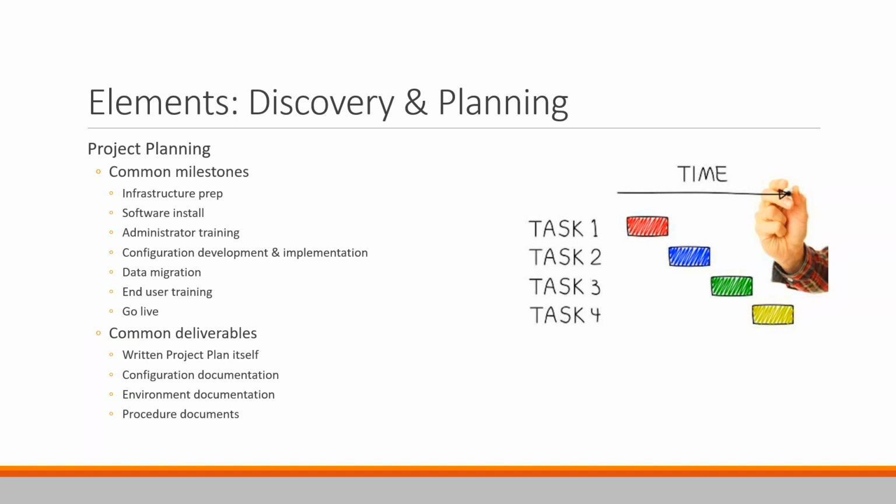Once the administrators are trained on how the system works and how to configure things, at that point it's usually best to go into developing the configuration of the system. Exactly what are going to be the button presses, what are the processes, what are the workflows. Trying to do that before administrators know how the system works commonly leads to a poor configuration. We've seen direct examples of that. I've got an example of that later on.